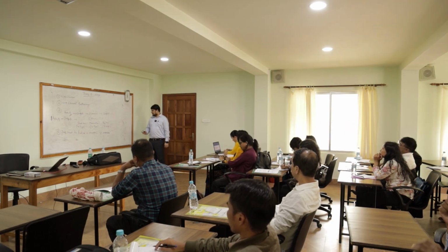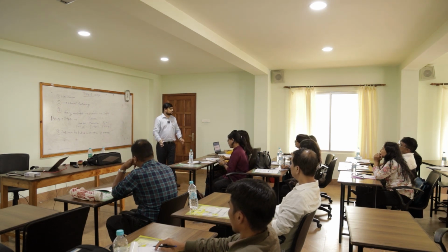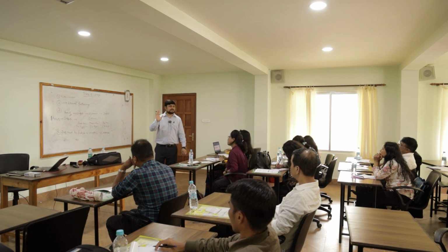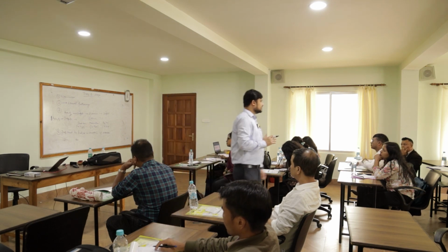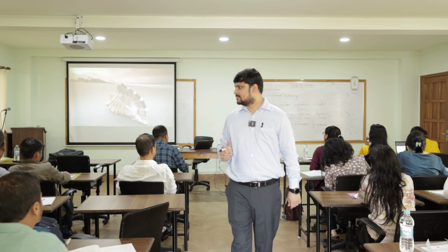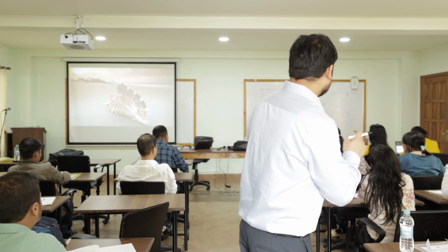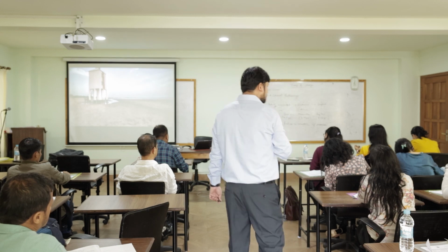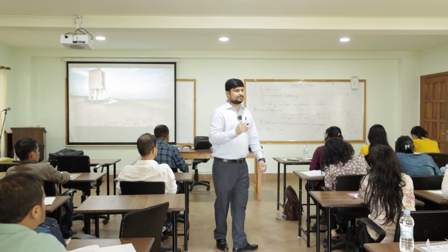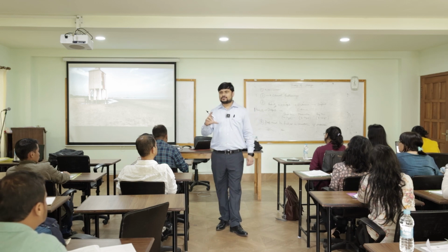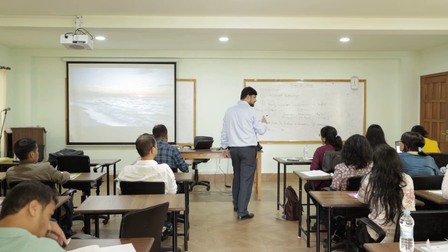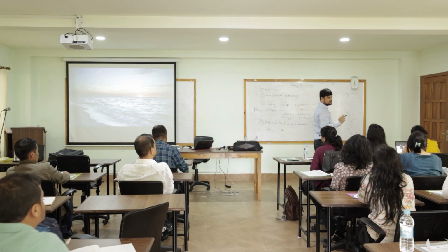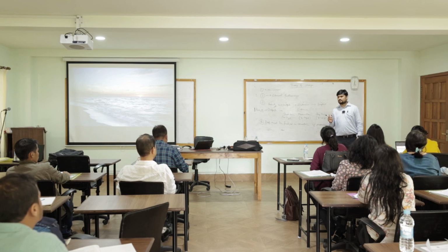And for each of these points, there needs to be a description that goes along with it. So one is the diagrammatic representation with all the arrows and how they are linked to each other, which we have already created. But there is an explanation that also goes along with it. How is this happening? How is it translating from one component to the other? What are the different activities that need to be conducted? All of that has to be put forth in a paragraph, maybe a couple of paragraphs. Not too verbose, but there needs to be an explanation that goes along with the theory of change. Okay?